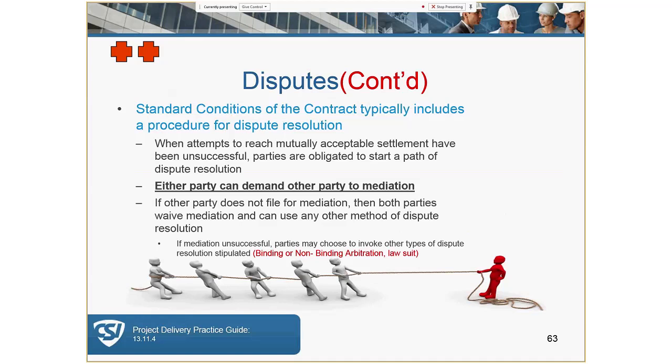If this dispute elevates beyond that and requires some third-party mediator, then that's going to be called mediation. And if mediation is not successful, then it may go to arbitration with a third-party arbiter. It may be binding or non-binding arbitration. Binding means that it cannot be disputed in a lawsuit and settlement is set. If arbitration is not successful, then it's elevated to a lawsuit and trial by jury.